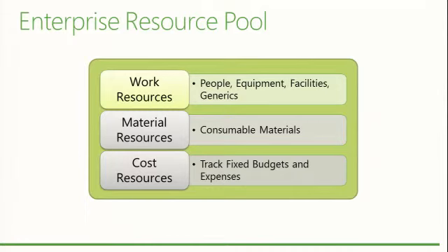Now, a work resource is any type of resource where you schedule and pay for their time. Usually it's people, real live kicking and screaming human beings. Not necessarily. It could be a crane or a conference room, some sort of facility. Anything where you schedule and pay for their time, that's a work resource, according to Project Server anyway.